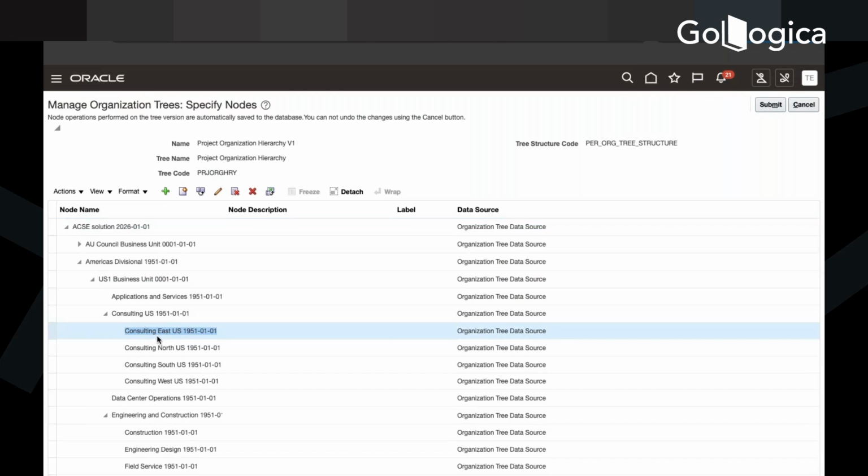So let's say you have one project. Under that project, you have 10 costs, each of $100. So the burdening will be applied on each cost. So $30 extra with that burden multiplier. So each cost will become 130.